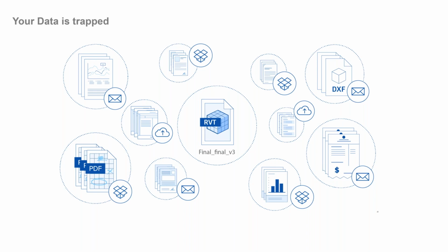to the subcontractor, the general contractor or the design consultants. Many questions come up around which is the current version, and this leads to errors and rework, many problems on job sites, cost overruns and delays, because project teams do not have access to the most current state of the documents.